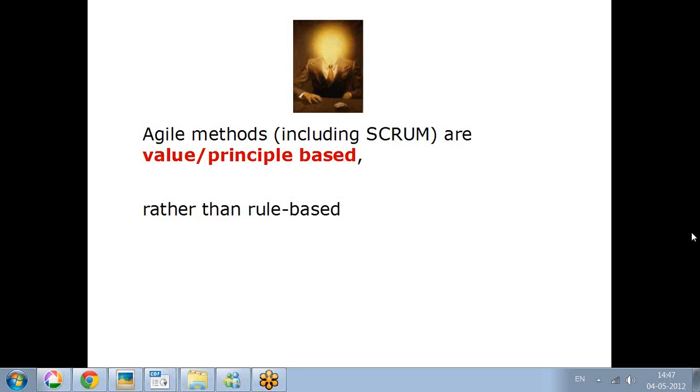A team doing low quality work may show high productivity and high velocity in the initial sprints. So a lot of things need to be understood. Blindly saying velocity is high, so productivity is high, is wrong. This is applicable within a project.